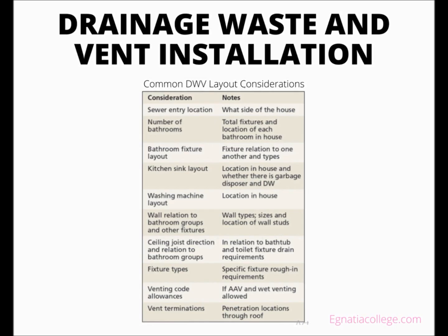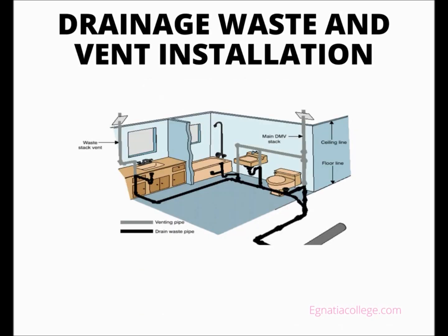In this section, we will look at a basic DWV layout of the above-ground rough-in for a house that provides some challenges. A plumber typically arrives on a job site when the framing is complete. In addition, any one-piece tub and shower units have typically been ordered and delivered to the job site.